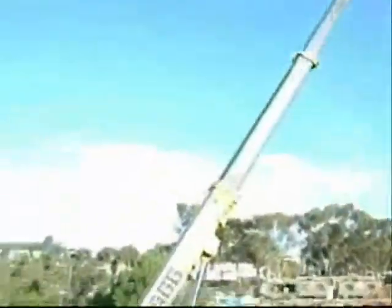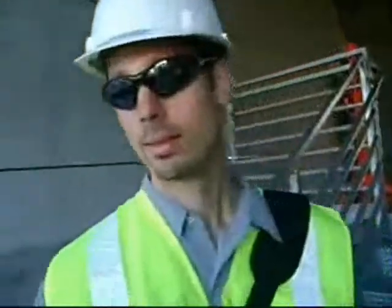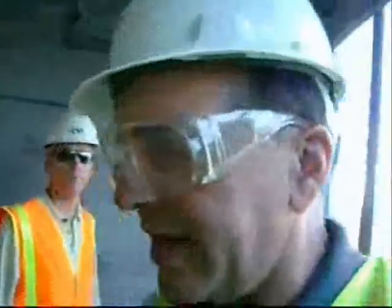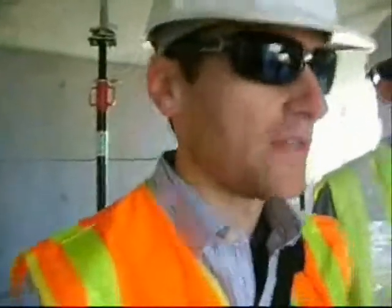This is a curing period for the whole building while it's under construction. That's right. And this crane is here ongoing throughout the project? That crane is going to be on duty until the end. Correct. Sometimes if you have a 20-story building, then you would have one of those 20-story cranes. This building is actually going to top out at 10 levels, so it's 9 stories. The roof will be at level 10, so they're able to use smaller cranes. If not that crane, they'll bring in a larger crane when the time comes.